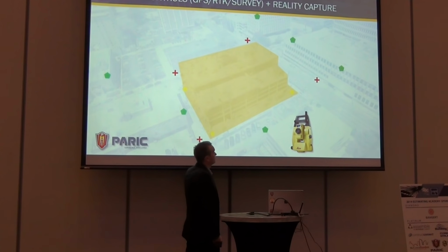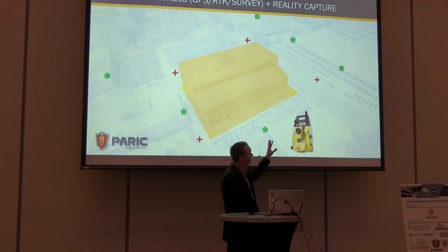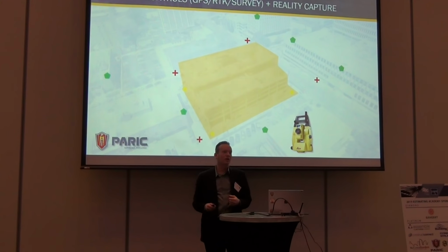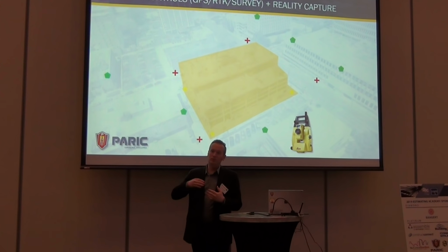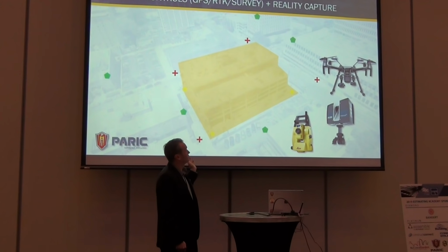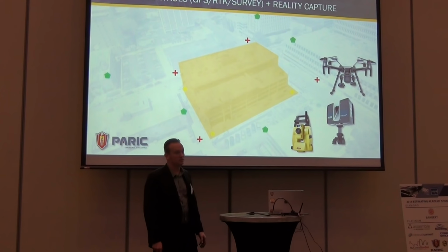And then we have some additional line-of-sight control that we put on adjacent buildings or structures so that we can progress up a building as we get into the construction phase, or, if it's an existing facility, we need reference points for a historic renovation type project. And then finally, as we pull this entire network together, we're ultimately tying it back to the system.